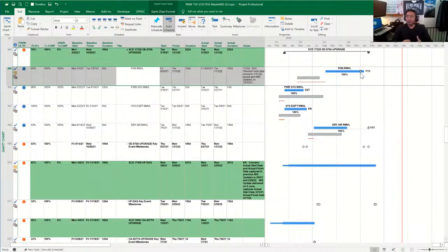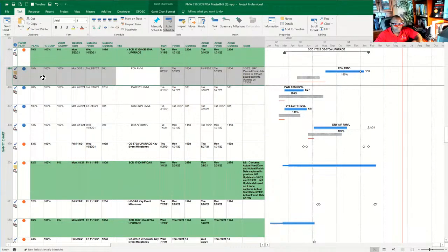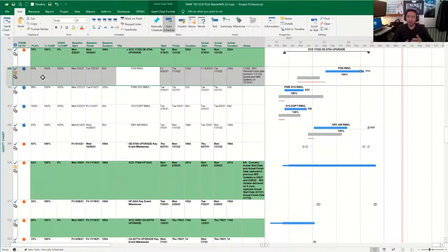Because by displaying that, you're able to say, look, we declared a deadline at this point, and we didn't meet it. So how can we better ourselves the next time around, now that it's been declared that we missed it? And also Microsoft Project does document missed deadlines, versus the leads or the lags. So that's why I encourage using deadlines instead of leads and lags.